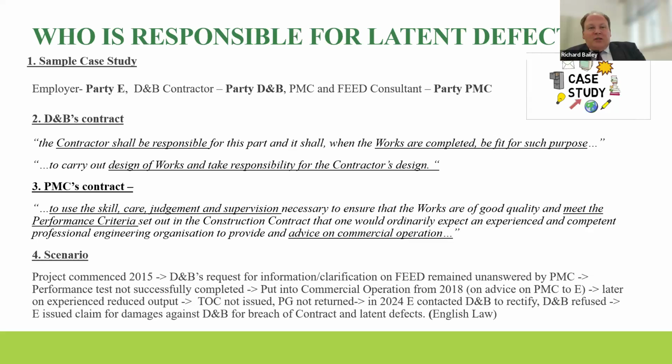Yeah, again, partially it's going to be looking at the contract, because there may be exclusions of certain types of losses, but also any loss has to be reasonably foreseeable. Law students are taught for years on these topics about what's in and what's out. But essentially, you have to look carefully at the foreseeability of those losses. Pure economic loss, recoverable. You have to actually pin your losses to arise as a result of that latent defect.